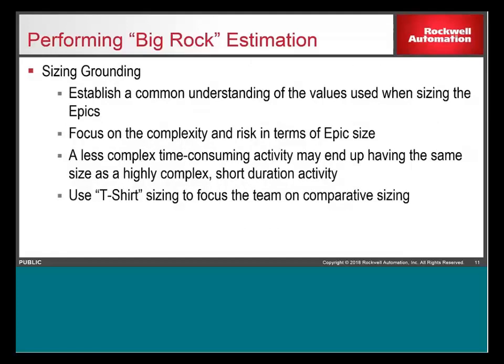All right, so for sizing and grounding, this is pretty important as well. This is used to help establish a common understanding of what is being used for scope, complexity, and risk when actually sizing these epics or big rocks. And again, it's really important to make sure that's the focus and not necessarily, it'll take me 2 weeks to do that. That's not really what we want to cover in this type of sizing session. We want to know, is this a simple thing and low risk, or is this going to be high risk and high complexity? That helps determine how big you're going to be trying to size some of these items.